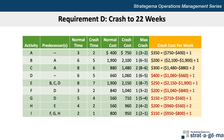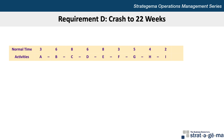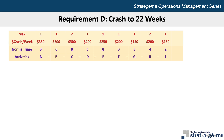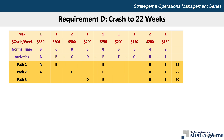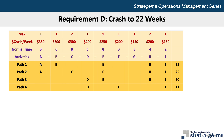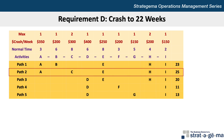Now that we know by how many weeks each activity can be crashed and at what cost, we can proceed with figuring out the optimal plan to get to 22 weeks at the lowest cost. I like to set up a table when crashing so it's easy to see all the activities, times, paths, and costs. Here's each activity with their normal times, crash cost per week, and maximum crash times. All five paths are listed: path 1 A-B-E-H-I at 23 weeks, path 2 A-C-E-H-I at 25 weeks, path 3 D-E-H-I at 20 weeks, path 4 D-F-I at 11 weeks, and path 5 D-G-I at 13 weeks. Path 2 is identified as the critical path.